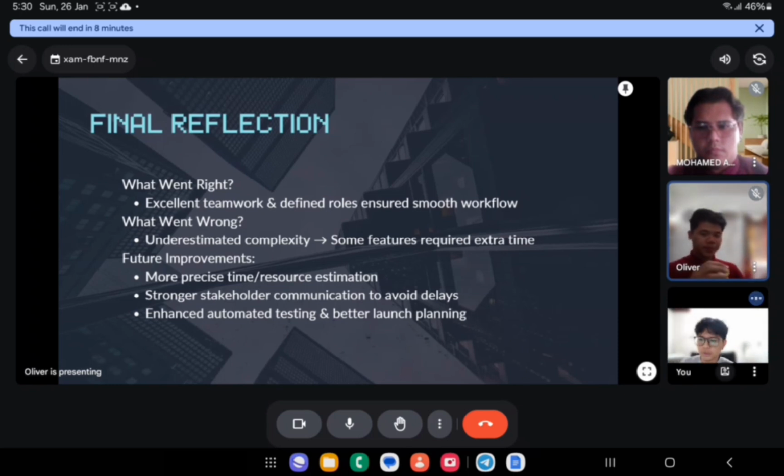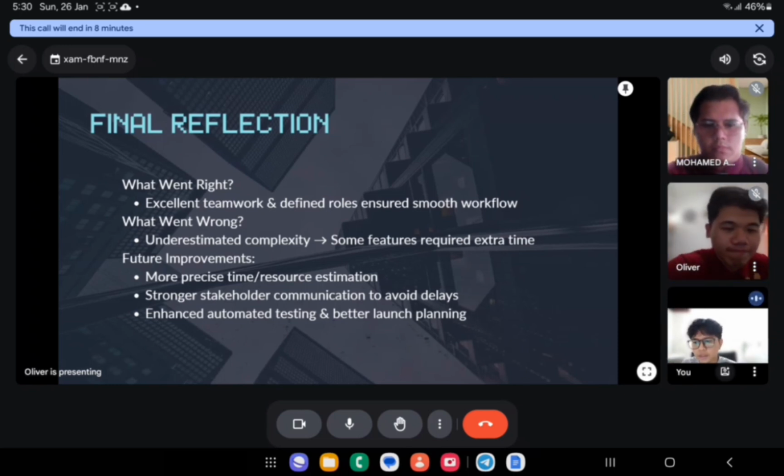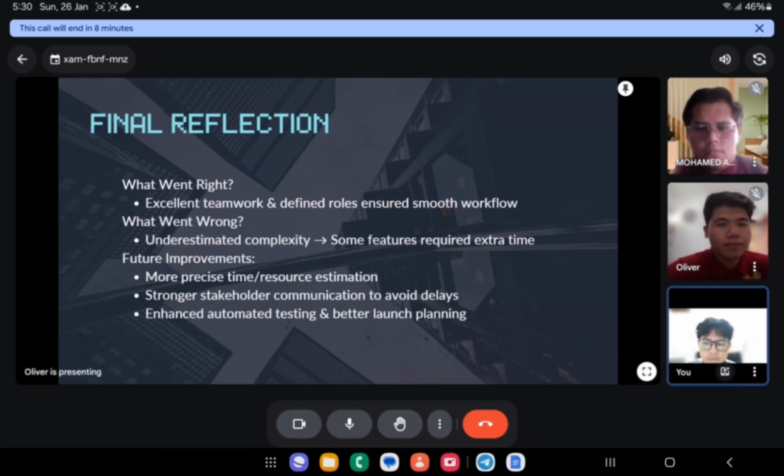Okay, the second question is what are the risks that the organization has to face in completing the project or system development. Alright, the first pertains to technical challenges such as app crash and server downtime. This issue can disrupt operation and frustrate users. The root cause often lies in poor code quality or inadequate server resources. Triggers like server downtime and bug reports highlight the need for immediate attention.